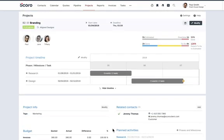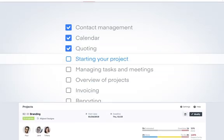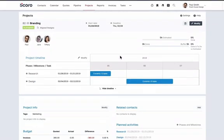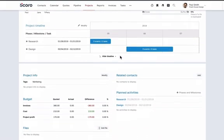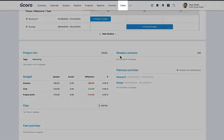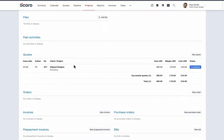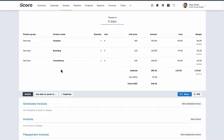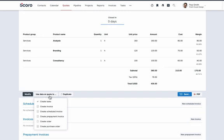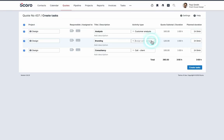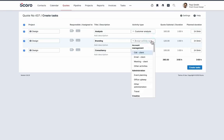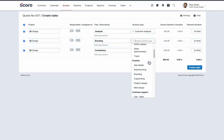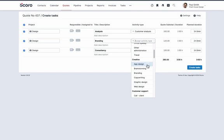Once you've created the project, it's time to start planning the work. You can create tasks from the planned activities section, the task list, or quick actions. But to save valuable time, we can go back to the quote and convert the items on the quote into tasks with all the necessary information already filled out. Since the items on the quote will be done in the design phase, let's choose this under the project. Link the task with a relevant activity type to get an accurate overview of the time you and your team spend on a project related task.